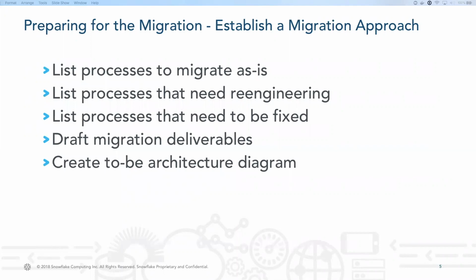Snowflake generally recommends minimal re-engineering for the first iteration, unless your current system is truly broken. The more rework that is done, the more development and testing will be required, which will most likely lead to a longer migration project duration and higher risk.